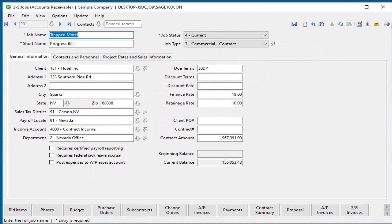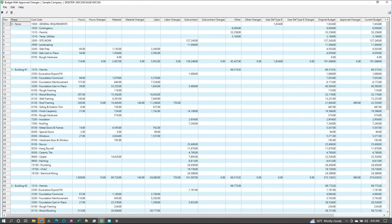The job can either be set up on the fly during the takeoff, or set up earlier to track win and loss reporting as well as schedule dates, bid dates, etc. The job and takeoff will then be tracked by cost code and cost type, phase, and bid item. Please note the changes columns created by change orders.